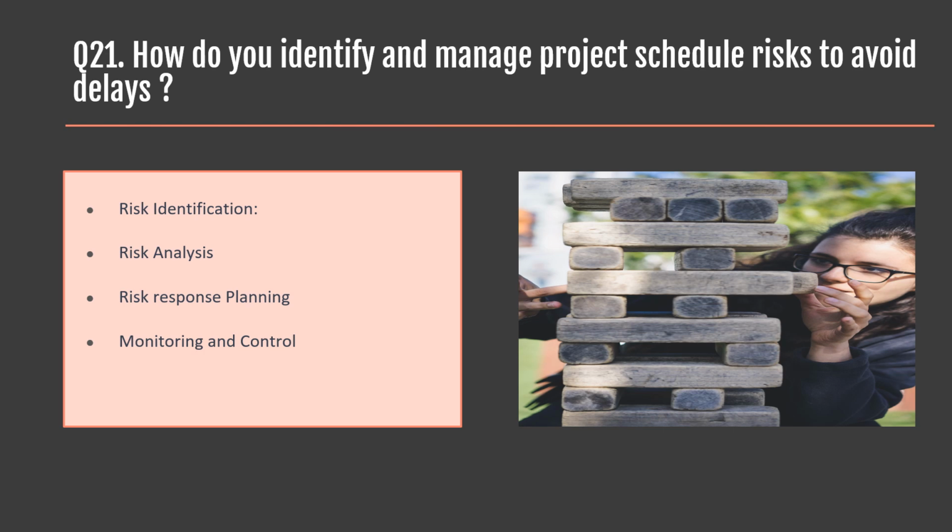Firstly, Mary conducted brainstorming sessions with the stakeholders to identify potential risks related to technology, resources, scope, requirements, and external factors like market changes and so on. She also identified the common risks and challenges faced by teams through previous project experience and used a checklist so as not to overlook any common risk.